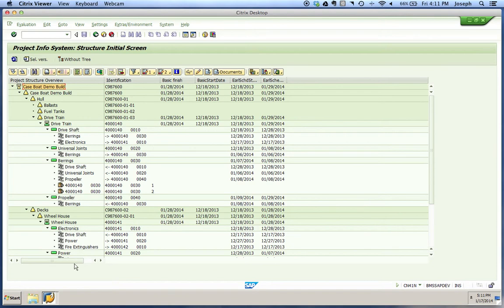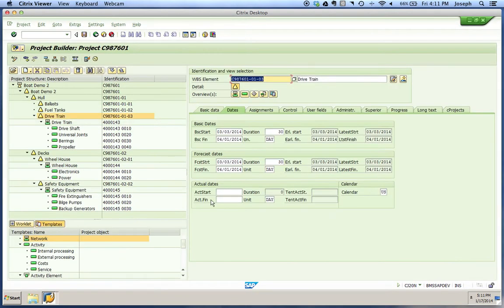Now we'll move on to forecast dates. Forecast dates are another set of dates used as ongoing comparisons in your project — sort of a baseline throughout the project. Forecast dates have no influence on your reservations, purchase requisitions, or any capacity requirements. These can be used to hold a copy of the basic dates and left alone until you have further detailed planning to carry out.